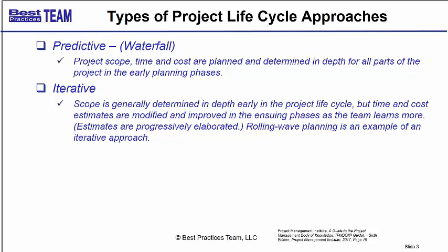At the beginning of this project for the basement, again, we just sketch in a lot of just sketchy details for the basement, level 1, level 2 of the WBS, and we might not get started on the basement for another 9 months or a year, so we'll wait 8 months. 7.5, 8 months to start filling in details in the WBS for the basement. We'll wait until we approach the time we need that to fill in all those details.